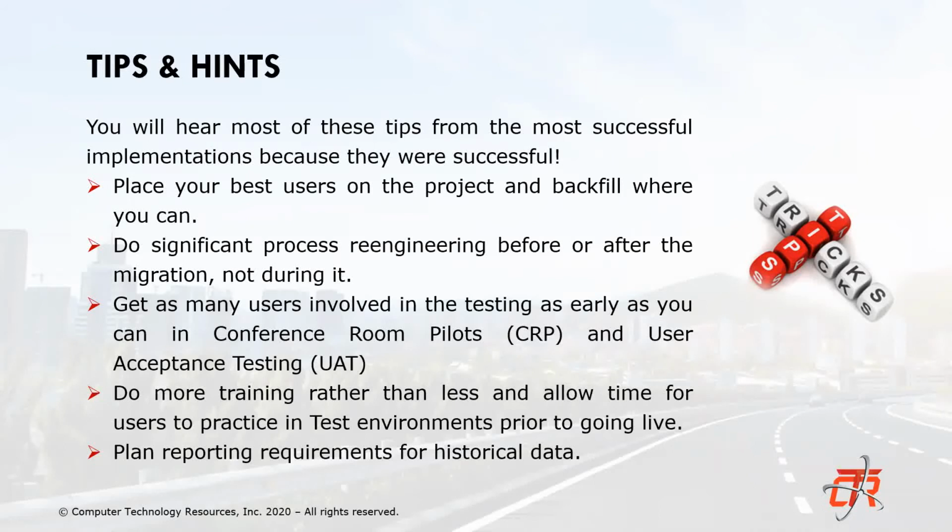Also maintain your issues log. I had an issues log, and it mentions here all the CRP, all the pilots. We had one while we were in pilot 1, pilot 2. What items come out of those pilots? We logged them, and then we would retest to make sure. I kept a log of what we had done, what we retested, if it worked, and if it didn't, we kept it, and we actually tackled those post conversion.